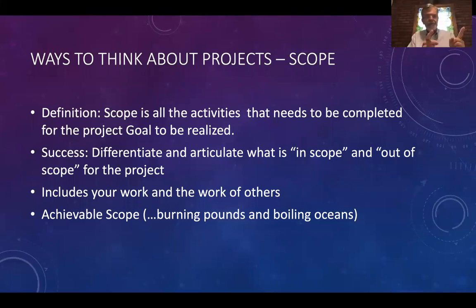You have to know both. Sometimes it's not enough to just put what you're going to do. You have to also include what you're not going to do. So I'm going to go back and scrub my entire database. But am I transferring it to command in this project or not? That makes a difference in the value statement and the ultimate goal of the project. It's things you have to think about in terms of scope.